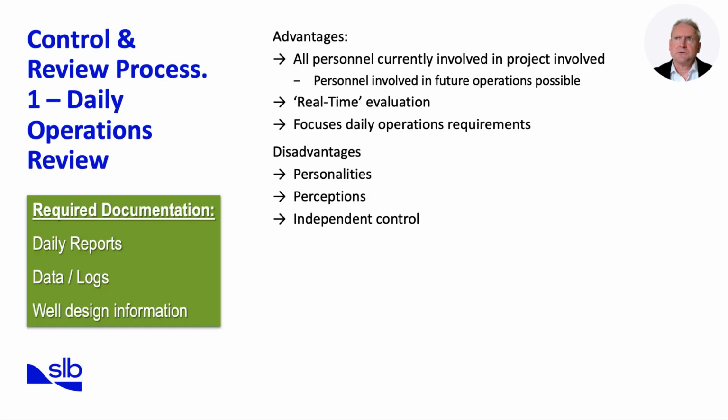The first level of review is the daily operations review. This is essentially a live check on what is happening at the rig site. One major advantage is that it involves all personnel currently working on the project, and in some cases, those preparing for upcoming operations. This real-time evaluation allows issues to be identified early, and the discussion is directly focused on the day's operational requirements. However, daily reviews also carry challenges. Personalities and perceptions often influence how problems are viewed, and because the process lacks independent control, discussions may sometimes drift toward individual biases rather than objective analysis.